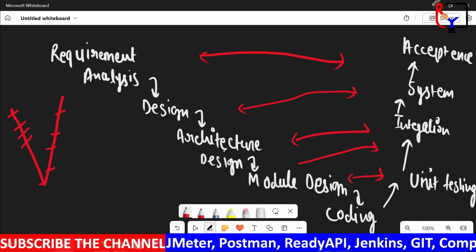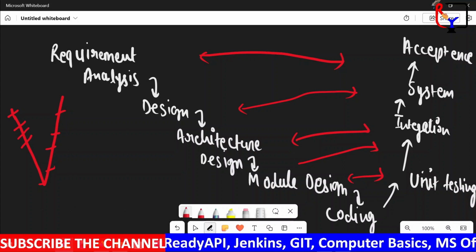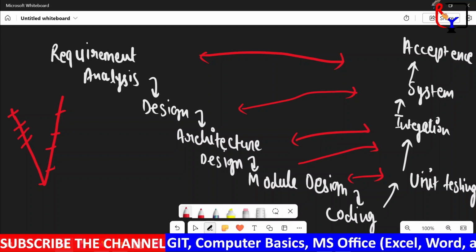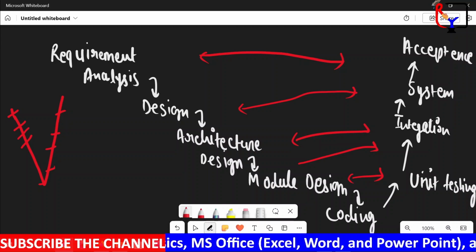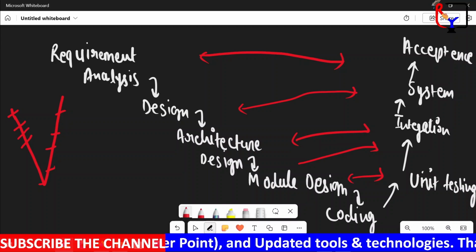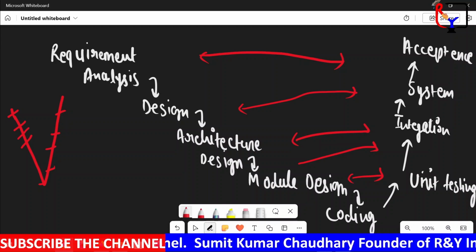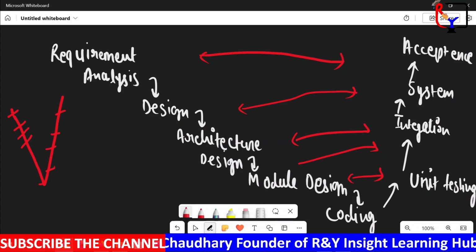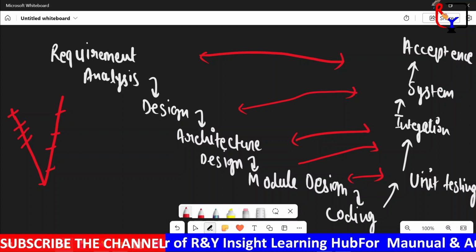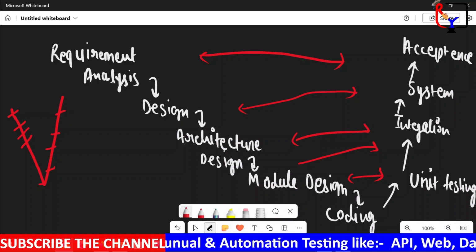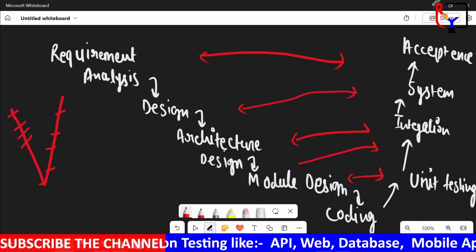However, the V model is still linear, making it inflexible. Like the waterfall model, a team can only start the next stage when the current stage is complete. This makes adjustments difficult, expensive, and time intensive. Therefore, this model is best for short projects with fixed, clear, defined, documented requirements, but it is not ideal for long, complex, or ongoing projects.